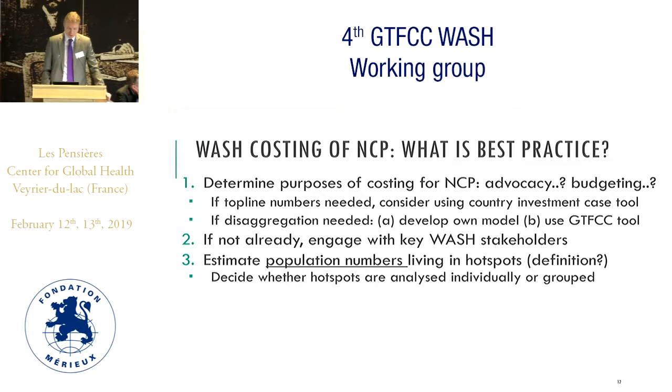So we need to know population numbers living in hotspots. That's part of the situation analysis. In order to aggregate at country level, we need to know whether we're looking at hotspots individually, or whether we're grouping them by areas of a country, or by severity or endemicity of the hotspot. Obviously, if you're doing it hotspot by hotspot, that's a lot of information that needs to be gathered, although you could apply similar standard unit costs across all hotspots if they're similar.